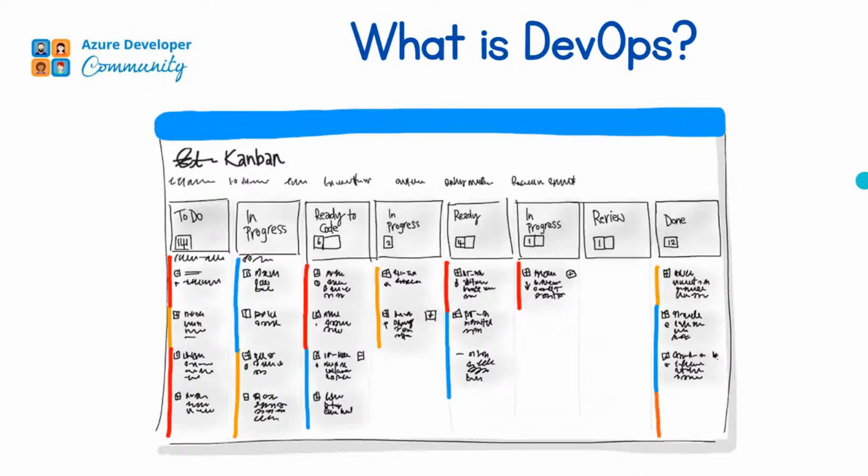Using agile planning and project development techniques, you can plan and isolate work into sprints. So if your work will be done in 30 days, you will divide it into two parts, 15 days per sprint. In the sprint, there are scrum meetings. So what are scrums? Scrum meetings are, we can say, 5 or 10 minute stand up meetings. In that there is one scrum master.